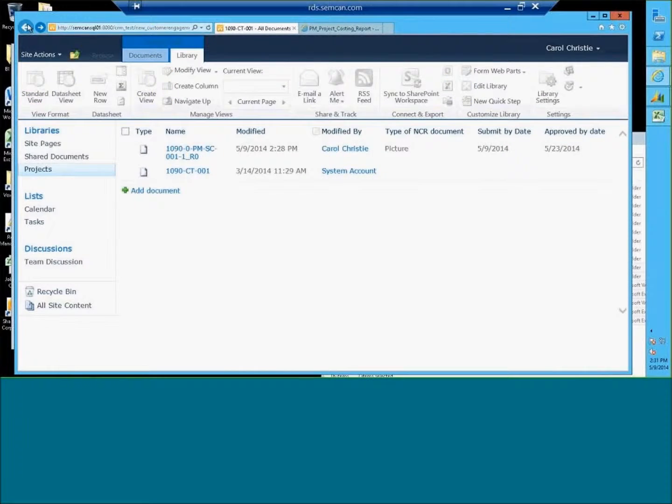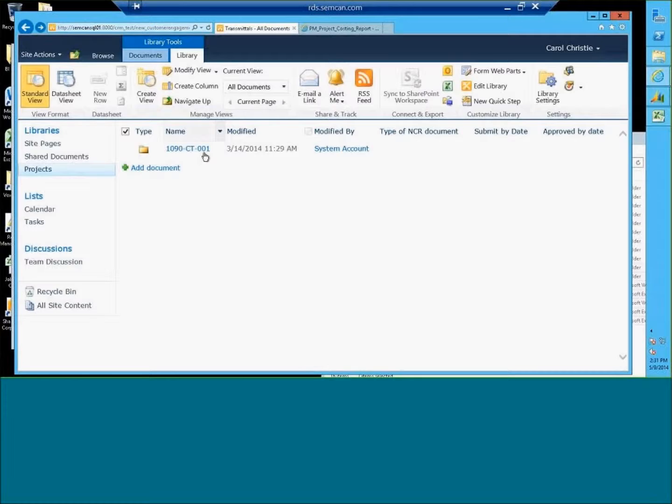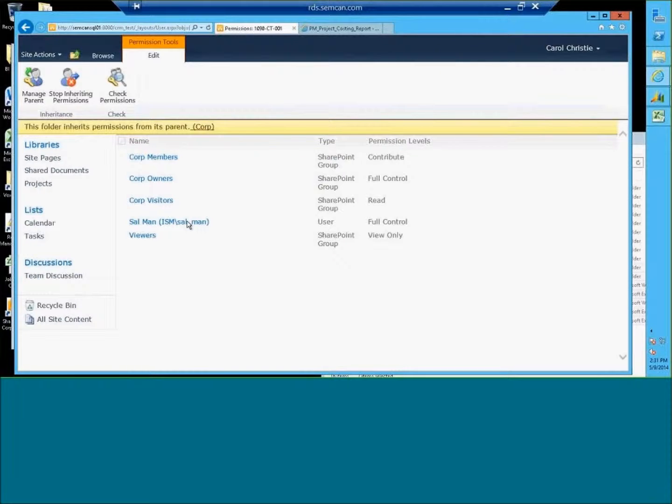So just go back up to the folder level. Way up at the parent, so at the job level, so the parent structure, you can begin to control securities through these things called managed permissions, and then every subfolder down, even to the file level, so you can control permissions. Now, you have to think about the folder structure as it relates to permissions, so that it doesn't become like a nightmare to control.